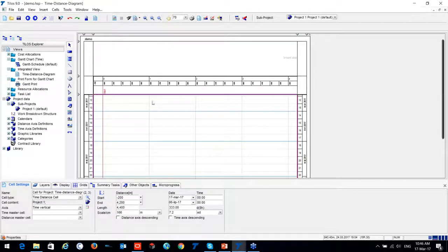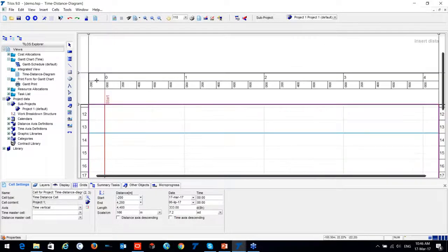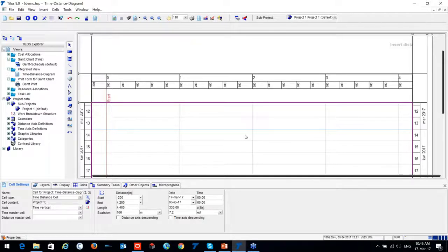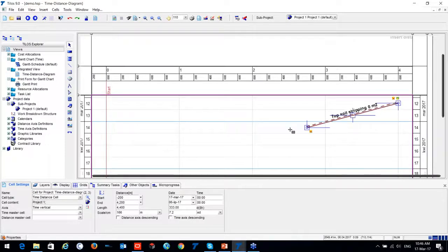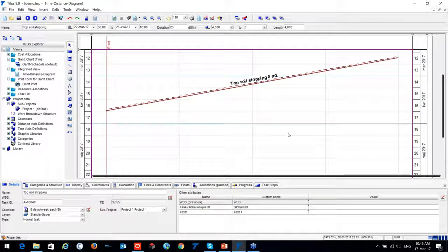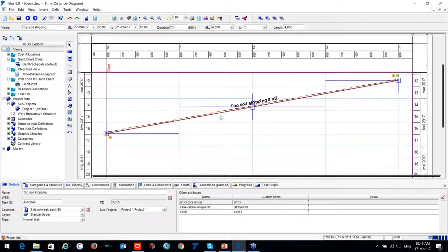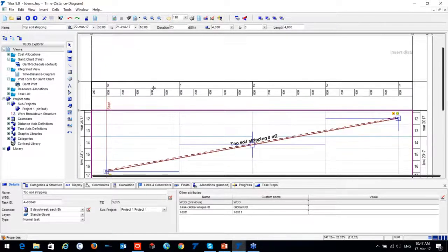Think about TILUS as a paper-based tool — you can take a pen and draw your activity or your project right on the paper. For instance, we have our start from zero and the end at four kilometers. I'm inserting one task from my template called 'topsoil stripping' and planning that task. It already has predefined information such as display and quantity fields — I don't have a quantity yet but will input it easily.